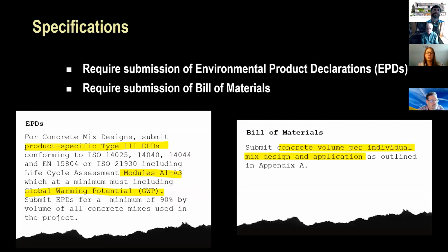So going out of design and into specification, which they might overlap, but one of the things I wanted to show is the specification language that we are putting out in our specs right now. So we've modified our specifications to include language that requires the submission of EPDs. And that kind of goes back to Dennis's point of earlier of suppliers being out there ready to do it and people needing to ask the question. So this is us trying to ask that question formally.